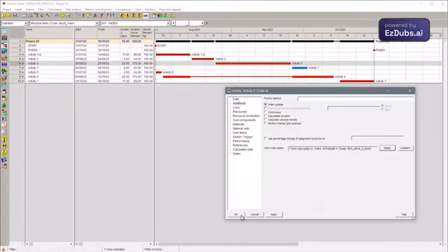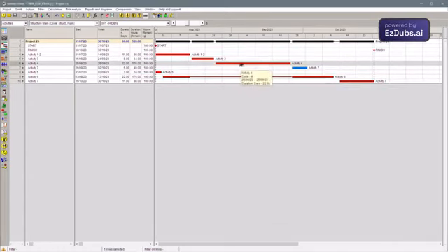So it's not a question of it being interruptible. I'm already informing you that it will work being stopped when it has 50% of its work completed and it will restart after 5 days. I'm going to do the CPM calculation, a simplistic method, just to show not the interruption of the algorithm, but the programmed interruption that I just did.